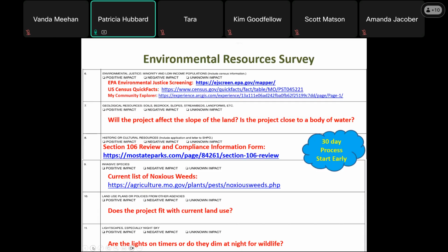You will also be required to submit topographic maps of the site, an APE map, and the scope of work of the project, which comes from question 57. This should also include project area size, the depth you plan to dig into the soil, and photos of any existing structures. Upon receipt of this information, the SHPO has 30 days by law to review and send you comments. Once you have your scope of work nailed down, you should start this process. It will take 30 days to receive a response back from SHPO after they receive your packet via email.